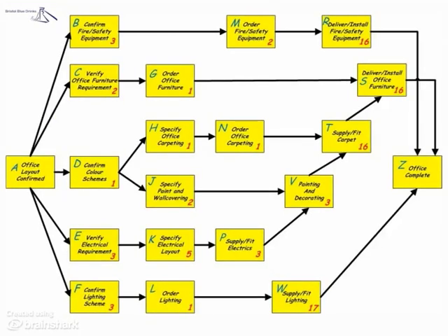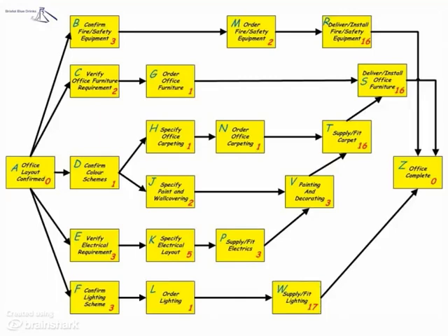Obviously there would be lead times for delivery of some items. With this in mind, I added that time to the activity I'd called Deliver and Install. So I assumed a day for the actual delivery of carpet, furniture and things like fire extinguishers and safety signs. On top of this, I added 15 days to allow for that lead time. I did an extra day in the case of lighting to allow for any adjustments to the electrical works. The activities A and Z were, of course, not actually activities, but milestones. Since a milestone is just a marker, there is no duration as such, so I marked both of these with a duration of 0 days.